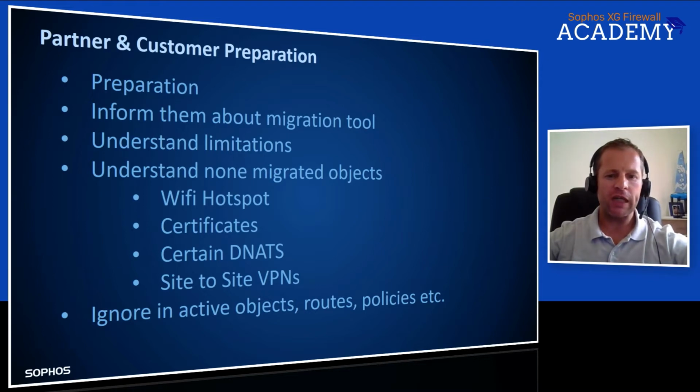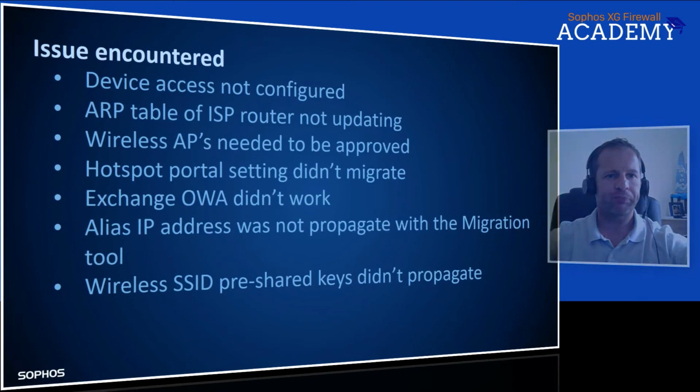So just identify those, look at which ones are being used, what traffic is flowing through them, and that will make your task a lot easier. You'll find half of the things you don't actually have to migrate, because they're not in use at the moment.